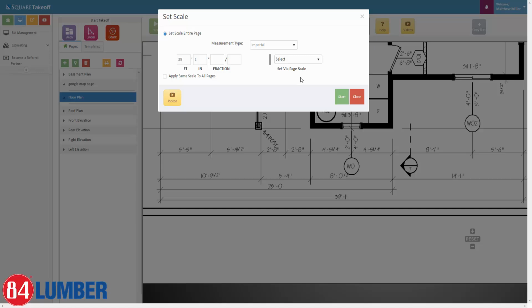The same thing continues on when utilizing an on-screen Takeoff program, that utilizing those type of files would not set the scale correctly. So if I was to drop this down and very quickly select 1/4 inch equals a foot, my scale might not be correct. So to prevent that headache, I always like to tell everyone to please use the manual scale. Always select a line larger than 20 feet if possible.